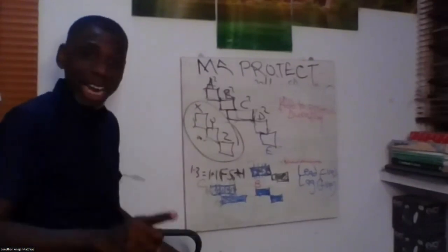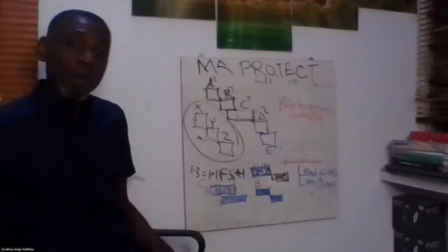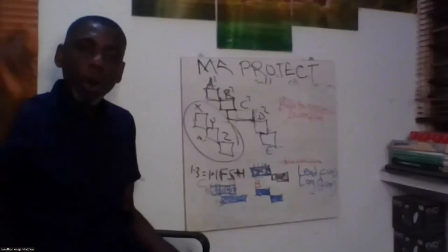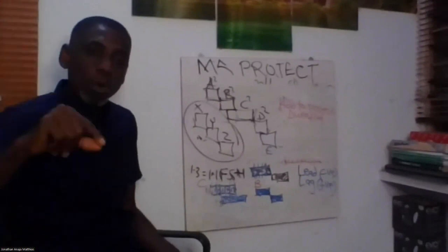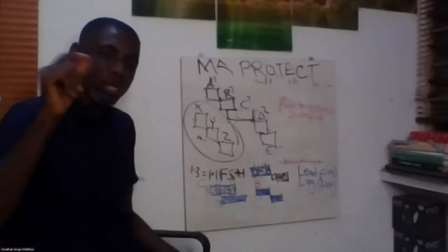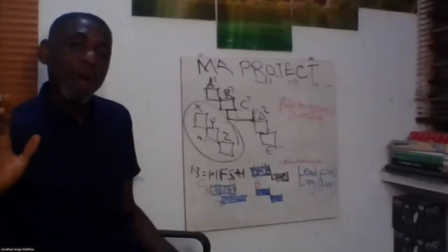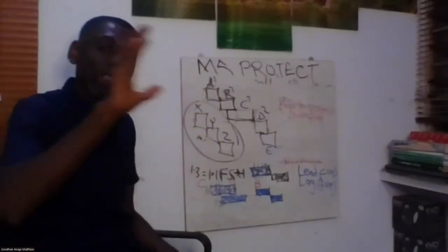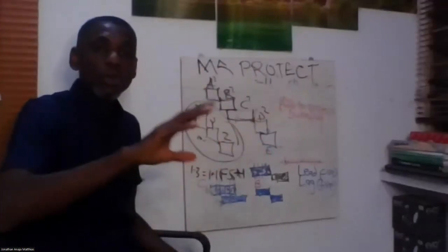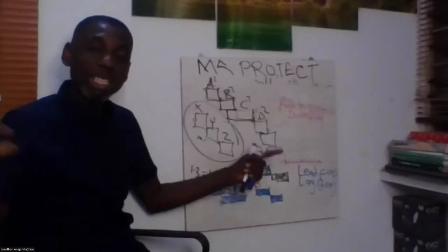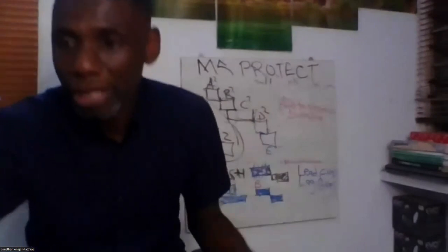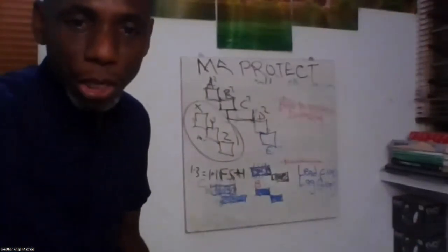So if you want to fast track and crash, all your schedule compression techniques should be applied on a critical path to be able to save time on your project. So that if you are pumping in resources, you are adding risk to the project by fast tracking, or adding more money to the project by crashing, you will know that you are doing it to save time because it's on the critical path. You do it on a non-critical path, you just succeeded in wasting your money.